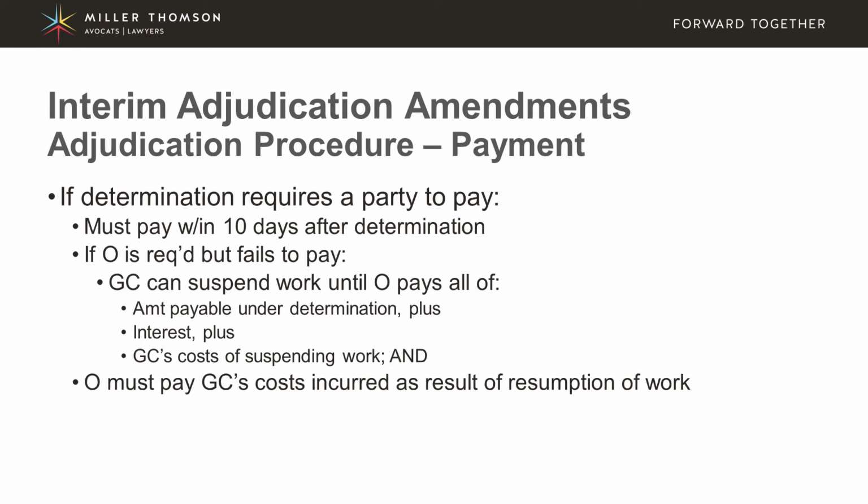So often they would stay on site because they would be worried that they might be deemed to be in breach of contract. So they would stay on site and keep working, and that would keep the project moving forward. However, this amendment now gives that general contractor the statutory right to walk off without penalty, and in fact, it gets rewarded the amounts that are owed to it before it has to come back to the job site.